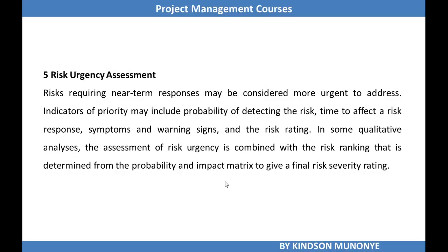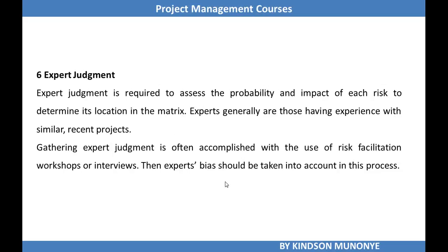In some qualitative analysis, the assessment of risk urgency is combined with the risk ranking that is determined from the probability and impact matrix to give the final risk severity.